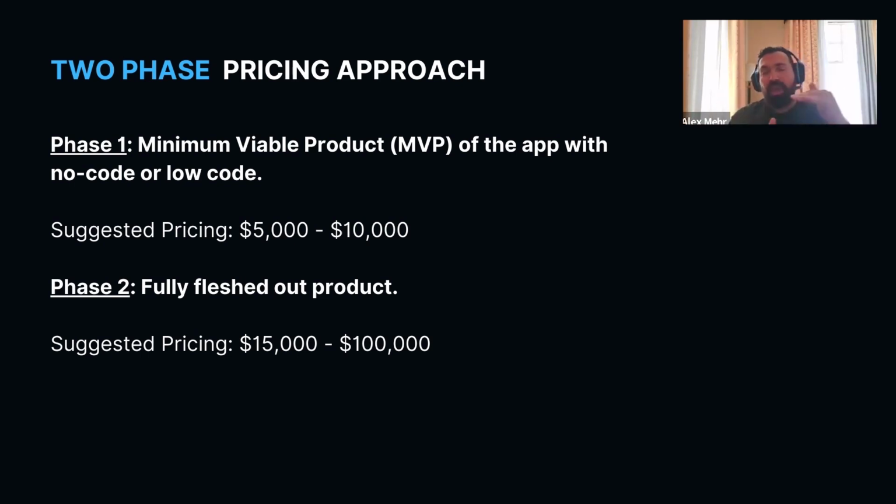So if you have a project like that, instead of selling a whole project, I would say do it in 2 steps. That's my suggestion based on the current state of the art and my experience. Do it in 2 steps. Say, hey, before we go build a full-fledged app that has login, beautiful input, you can upload a PDF, it reads the PDF, and takes their current training into account and all that, let's create a minimum viable product out of it.